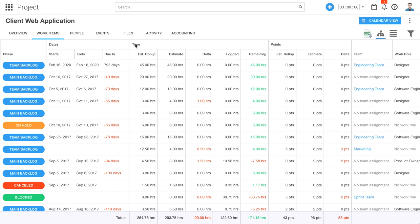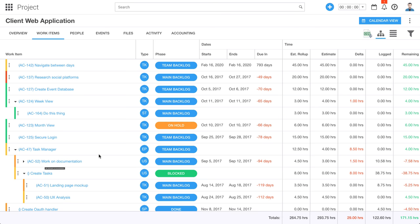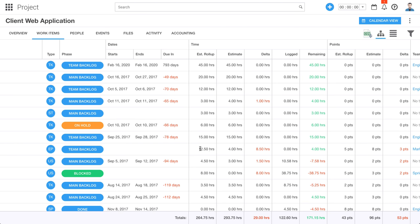We give you some really powerful information around time estimates. We have estimated time — so when I create a work item, I can say I think it's going to take 20 hours. Let's look at this one: I think it's going to take four hours. But as is the case with this item, this happens to be an epic, and it has some nested items inside of it, each of which might have their own time estimates. So I've got this estimated rollup column. Essentially, I estimated this particular epic to be four hours, yet when I created child work items inside of it and gave each of those estimates, it ended up rolling up to 12 and a half hours.